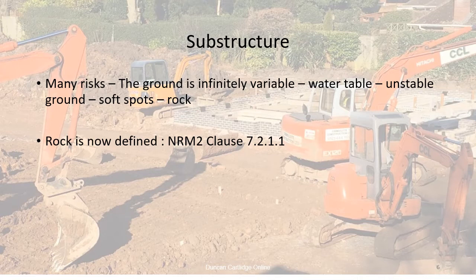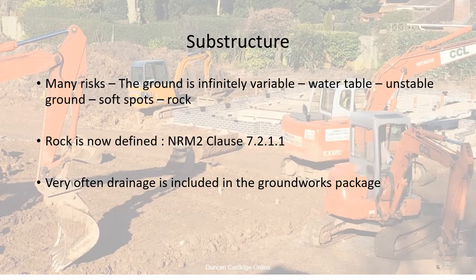NRM2 now contains a definition of rock, as this has long been a bone of contention between contractors and clients' QSs. The definition is: rock is any boulder greater than 5 cubic metres, and additionally, any boulder that can be removed by an excavator bucket is not rock.